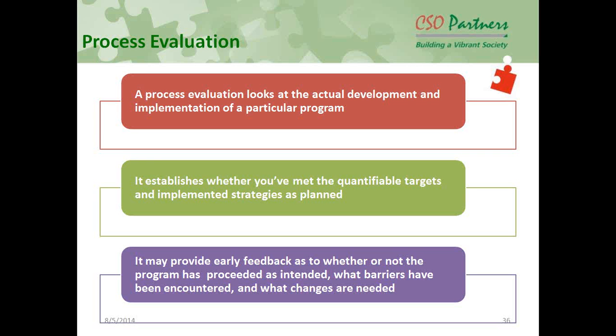See, evaluations and monitorings are not always done directly. You will have to have two systems. One is that somebody is going and doing on-field monitoring, and the second is the flow of information from the field. One, documentation and reporting, so that while doing the training, whether it is being documented properly, you have a periodic reporting system. What should be the period of the reporting system? What information do you need to capture? What kind of format will you be using? Those things should be in place before you launch the program. During the process, you might refine those systems and formats, but they should be in place beforehand.